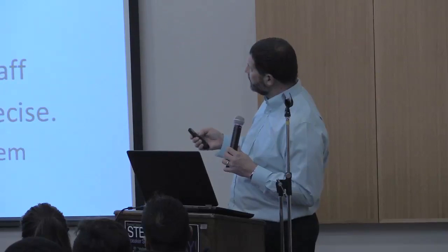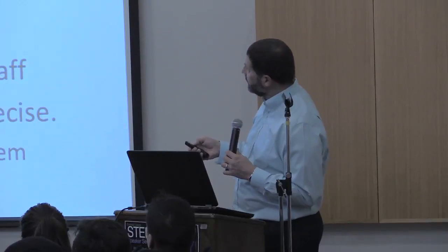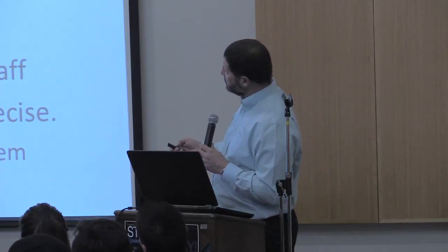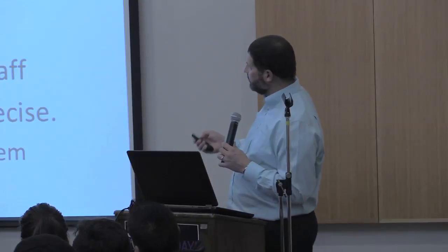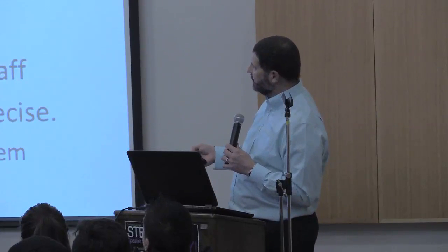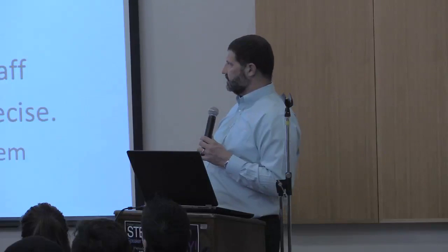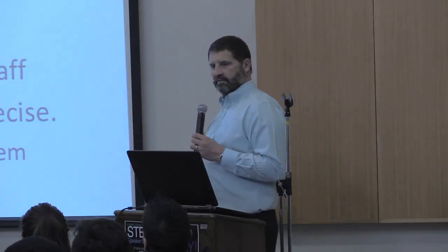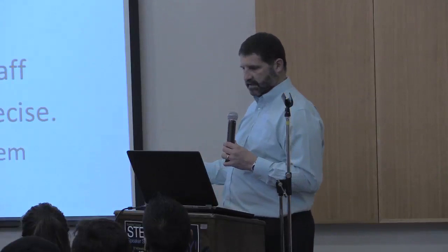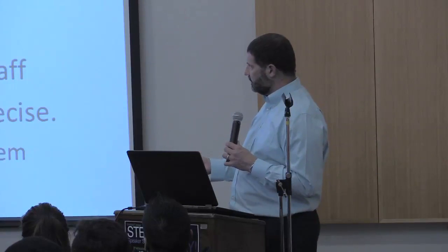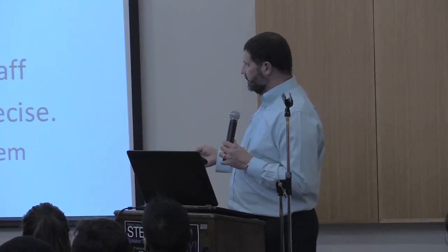And then using consultants, so I talked to Bill about how it's efficient to do that. Generally, hire them before you need them, so you get used to working with them, let them know when you're going to need them, establish a communication matrix, so who's going to talk to whom, and who for what, and then an escalation path and backup people, and then training on the details of working with you.